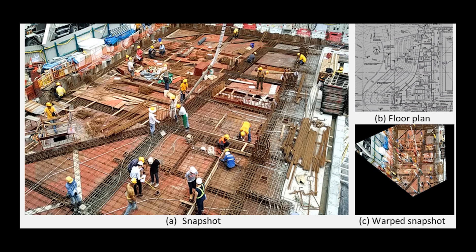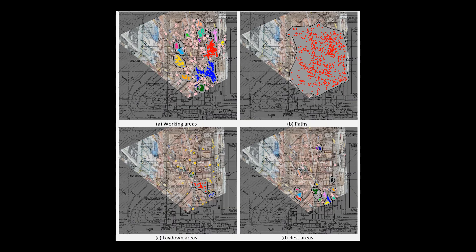Following this procedure, PI can tell us what activities are going on and where, how many man-hours have been used, as well as activity durations, frequencies, intervals, and sequences. Finally, it evaluates the activities according to these information items against their method statements to identify if there are any quality deviations.